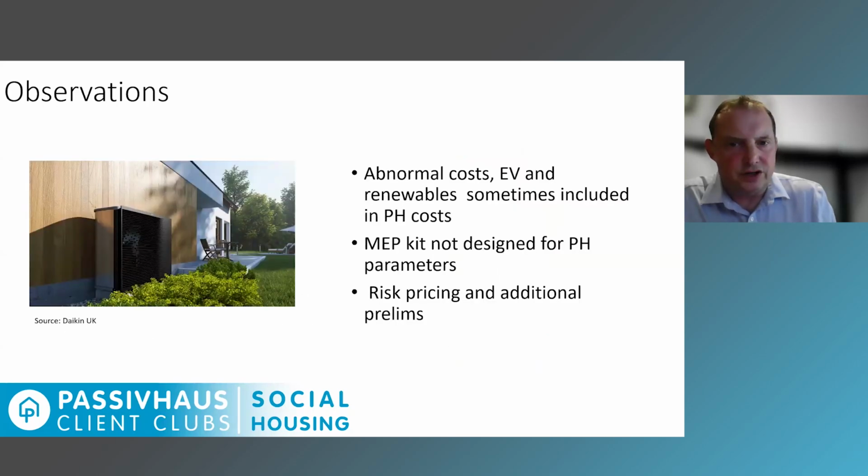Okay, and a few observations. Often other costs are lumped in with Passive House costs. They're not necessarily. You just need to be very mindful of what you're designing and split it properly. And always be aware of risk pricing and additional prelims. It happens less once the market is aware of what you're trying to do and how to do it.